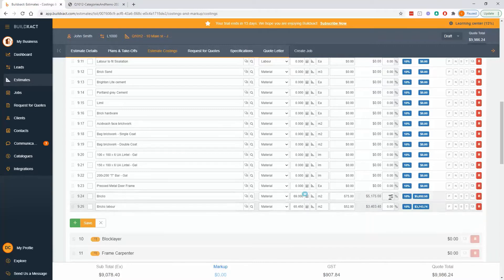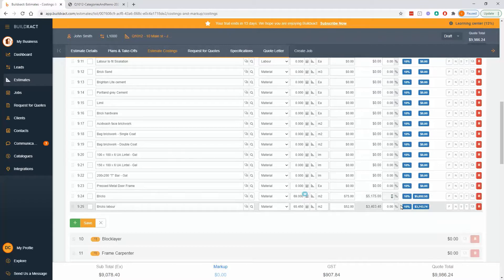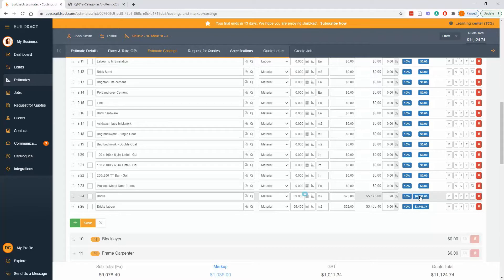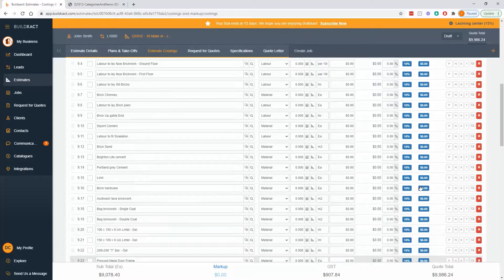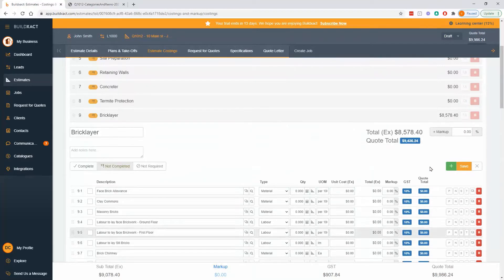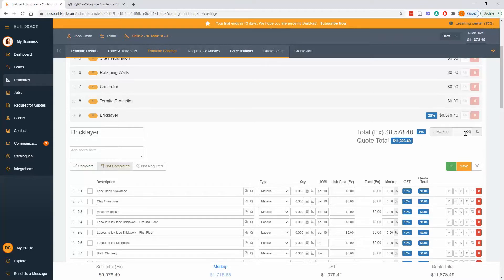First of all, you can add it at the item level. So I could say these bricks on their own get 20%. You'll notice this price over here changing. We'll delve more into that in a tick. But I can say at the item level, 20%. I could also go up to the category level and say this whole bricklaying category attracts 20%.